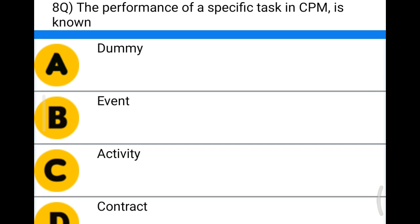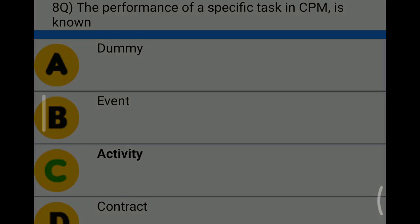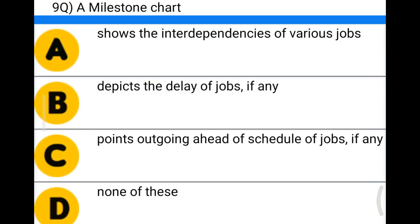Next question: the performance of a specific task in CPM is known as — Option A: dummy, Option B: event, Option C: activity, Option D: contract. The correct answer is Option C, activity. Next question: a milestone chart —